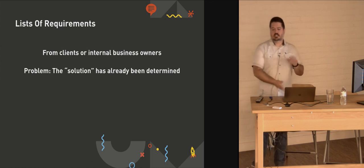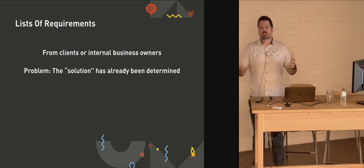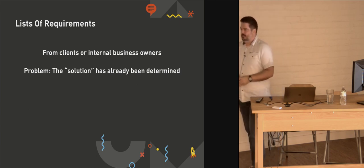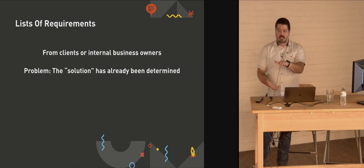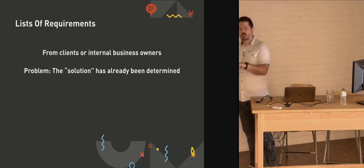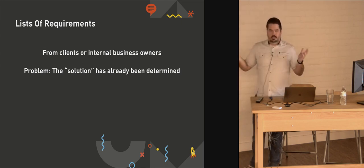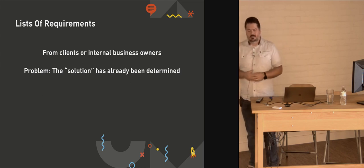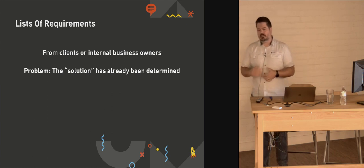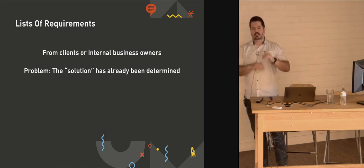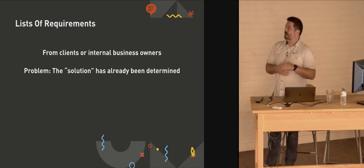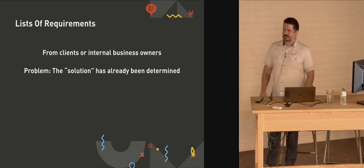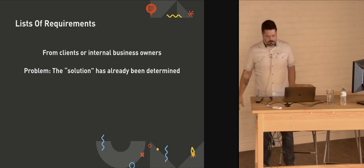So there becomes this list of things to do. And sometimes people are tempted to like, oh hey, I don't have anything to do today. I'm going to grab something from the backlog and work on it. But it may not be prioritized well. And you can mitigate some of that by having a scrum master or product owner who's always keeping an eye on that stuff and keeping things there. But having, to me, having a large backlog can get into this list of requirement thing because context is lost over time.